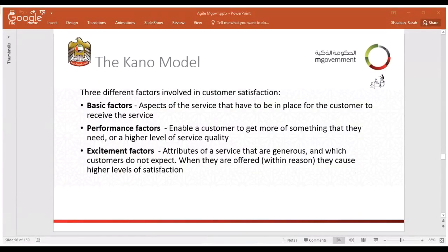Is it clear how we do prioritization? So we do prioritization either by the 80-20 rule, which means which requirements will provide 80% of the benefits of the project, and this is usually 20% of the requirements. So this is the Pareto model. Another model is the MoSCoW, which is must have, should have, and could have, which is the way to organize requirements around. Is it clear? Okay, I will take this as yes.